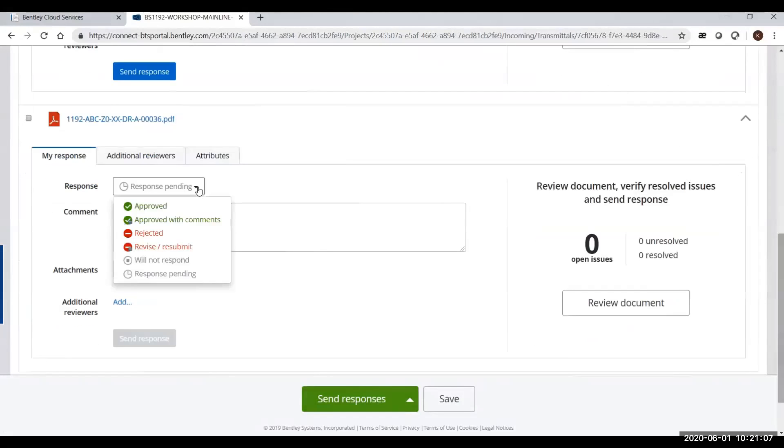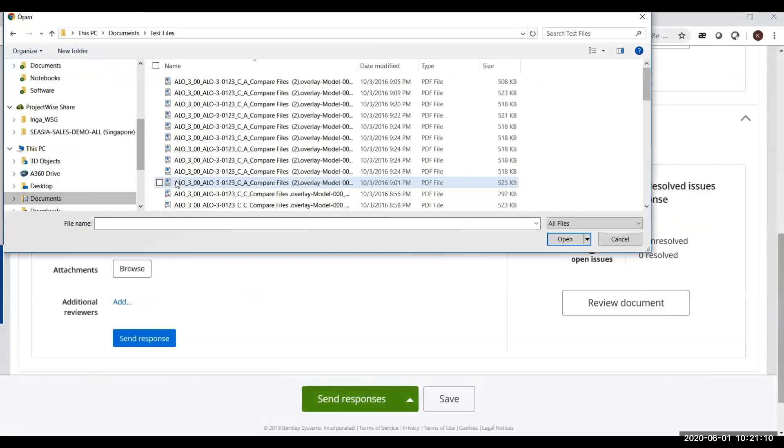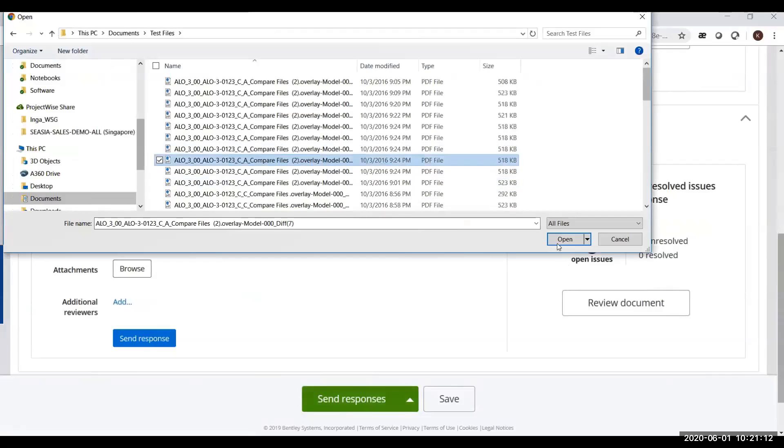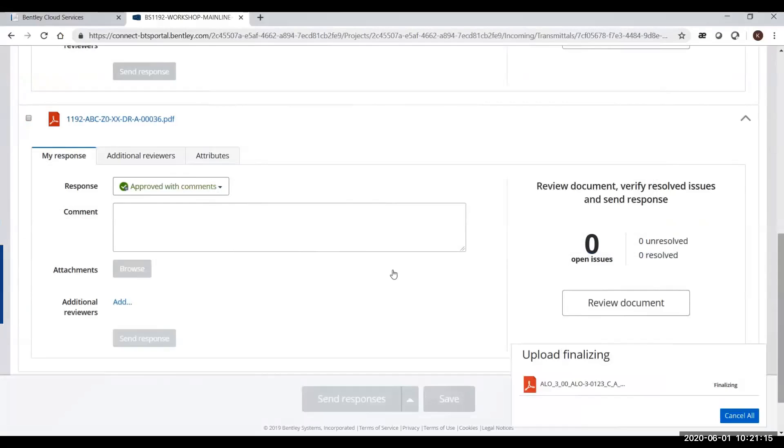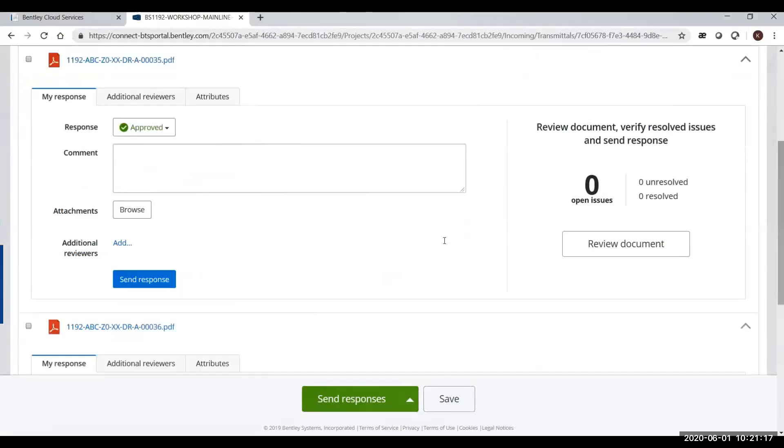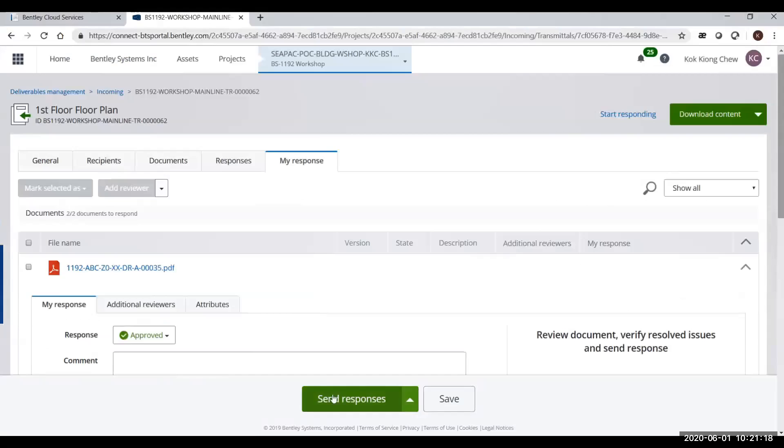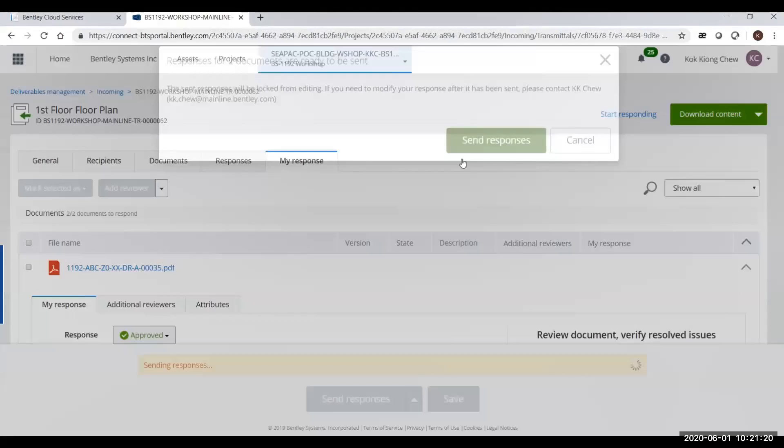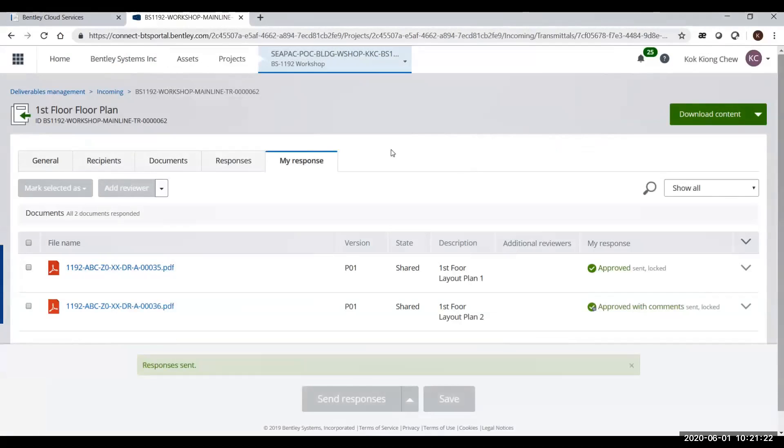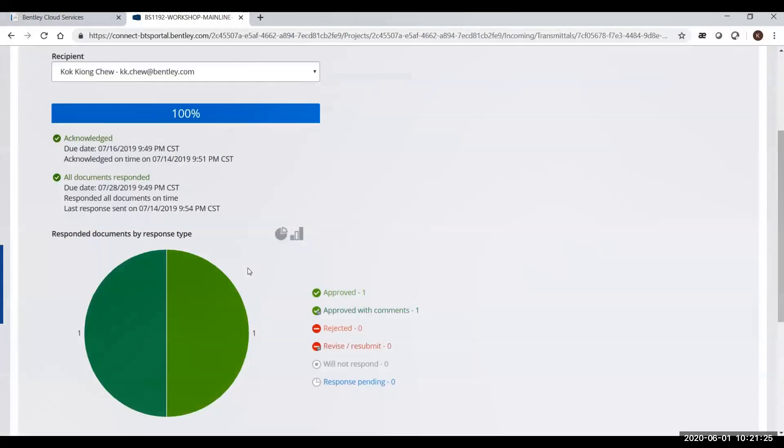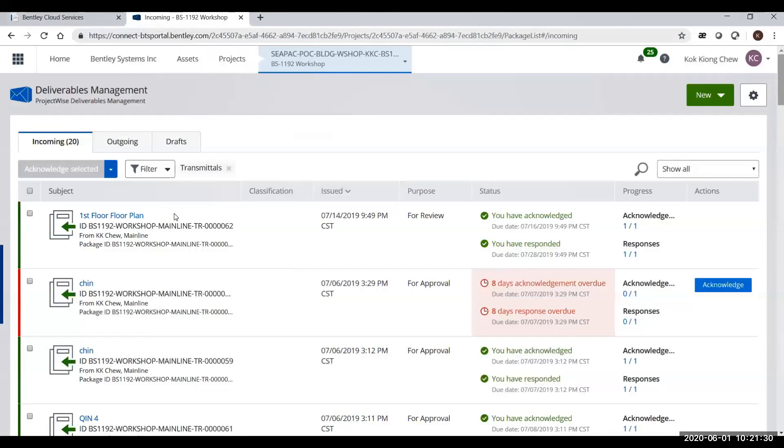If the next document is approved with comments or accepted with comments, you can attach the commented file. The response status is up to you to define for your project. Once you're ready, you click the send button and that response will go back to the sender. This is how you handle electronically tracking the responses on the transmittal.